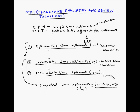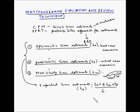To clarify: TE equals TO plus TM plus TM plus TM plus TM plus TP — so TM appears four times. Taking the average means dividing by six. This becomes our formula for expected time estimate calculation.